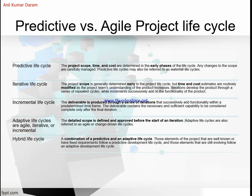Coming to the adaptive life cycles, the important ones are agile, iterative or incremental. The detailed scope is defined and approved before the start of each iteration, for iteration 1, 2, 3. For each iteration it is approved and defined so that there will be no fluctuation, I mean no problems, occurring in the later stages of iterations. And coming to the last, the hybrid life cycle, it is a combination of the predictive and adaptive life cycles. We'll come to more detail in the next videos.